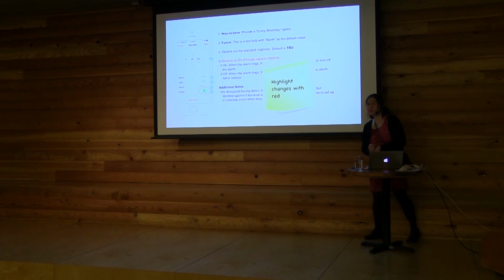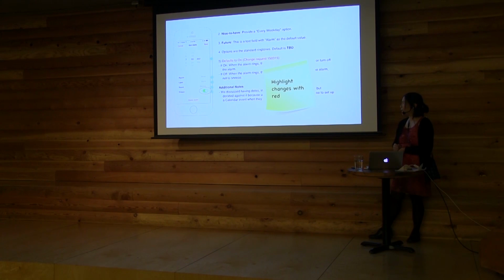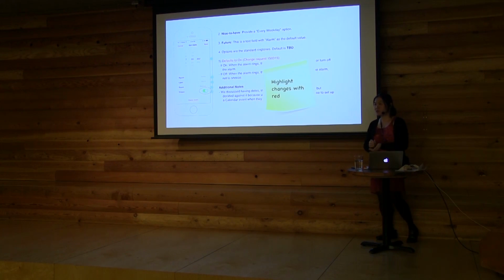Yeah. I think for most changes, the changes that I've got in mind are really one-line changes in the spec, with very little effort from the designer. It's a lot more effort to go through the whole approvals process and everything. That's what designers are afraid of. They're not afraid of doing this. This takes 5 minutes. But for things that do take more time for the designer, if it takes more than half an hour or something, then yeah, I would create a user story for that and schedule it. Get a user story for the designer. Yeah, that's a good question.